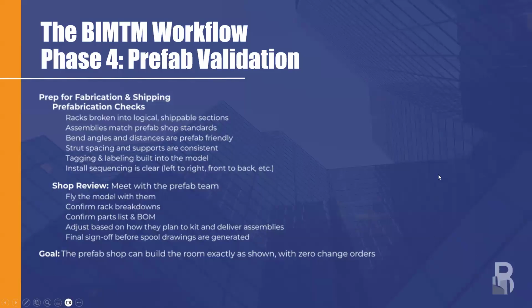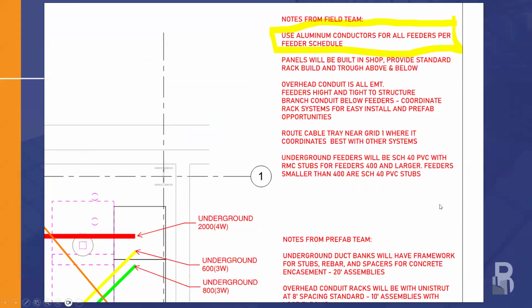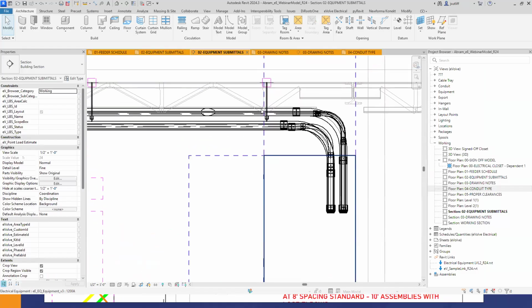I think back at that previous slide that you have, money is oftentimes a good motivator. Money is always a good motivator. Yes. I've run into an issue where I couldn't get my radius 90 down to the top, so we had to custom order and manufacture a top hat for our gear so we could just go in and 90 inside of a box. That custom top hat ended up running us probably, I think it was like 15 grand. So, go to your PM saying, hey, I need this.